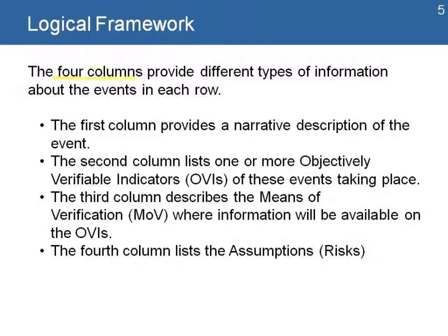The four columns provide different types of information about events in each one of the rows. The first column provides a narrative description of the event. The second column lists one or more objectively verifiable indicators, or OVIs, that are taking place. The third column describes the means of verification of the OVIs. And the fourth column lists all the assumptions and risks for each one of the events.